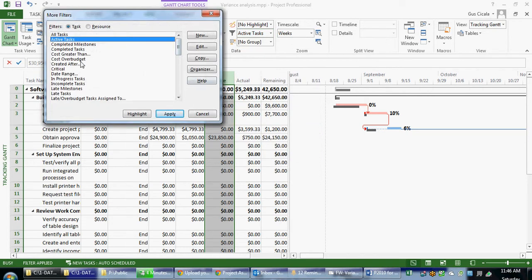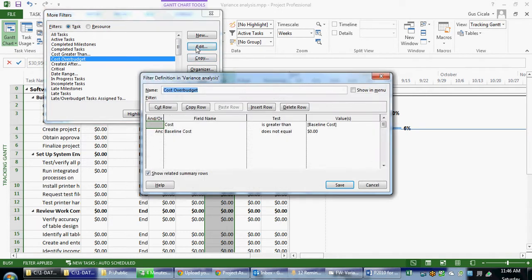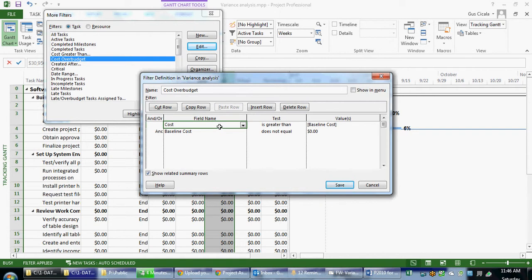I mean cost over budget. If I look at the cost over budget filter, it says it's going to show me any place where the cost or the current estimated cost is greater than the baseline cost. Okay, so the current estimate is greater than the original. And the baseline cost is not equal to zero, which means it's either been baselined or it has some level of cost that's been applied to it.